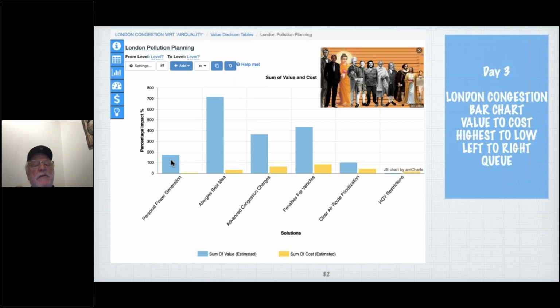So what we've done, we've actually sorted the spreadsheet so that the smartest thing to do with the lowest cost probably means you can do it in a small sprint, like a week or two. Maybe, maybe not, but very low cost is often taken into consideration. And then it gives pretty good value for money. And this gives far more value for money, but it looks like it costs, generally speaking, 4 times as much. So it might not be the smartest thing to do next week.